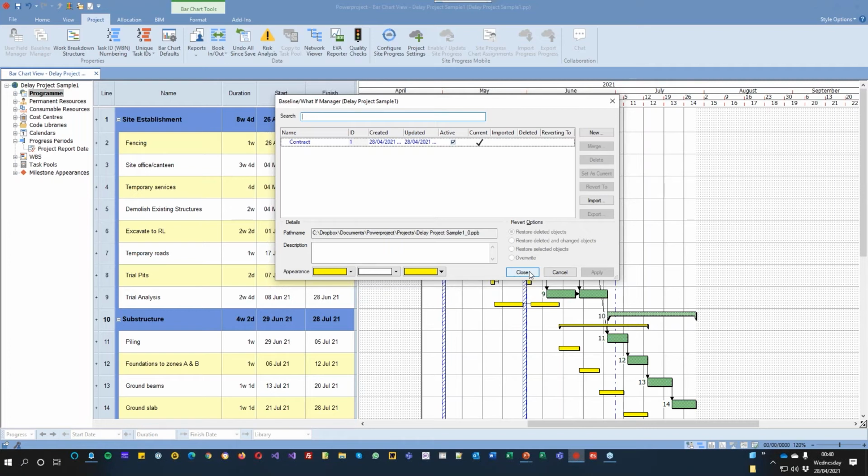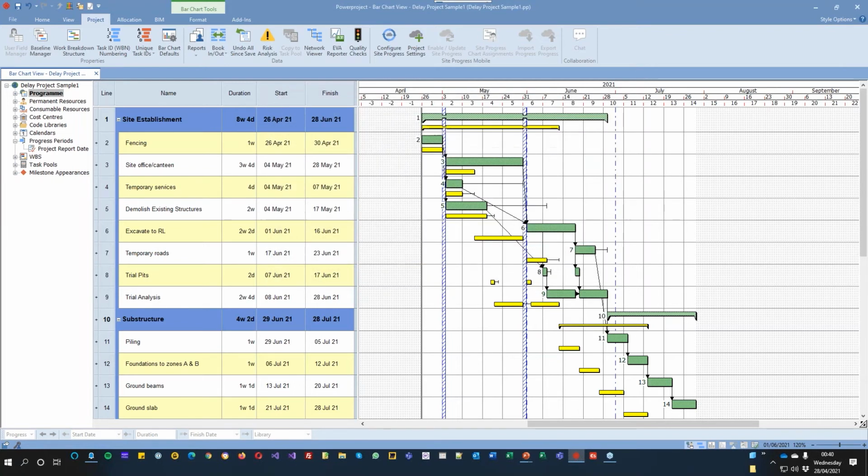You could go back and say, I want to look at 5 weeks ago, 12 weeks ago, and do a comparison and see how they are. You can even open up an old baseline and bring an older baseline with it, compare week 15 with week 8 if you wanted to. But you may not use them, and all it's done is create an extra baseline file. And these baselines can be created alongside the actual project file you've got, or inside it, your choice of which you do. But if you're doing lots of them, just create them as standalone baselines.